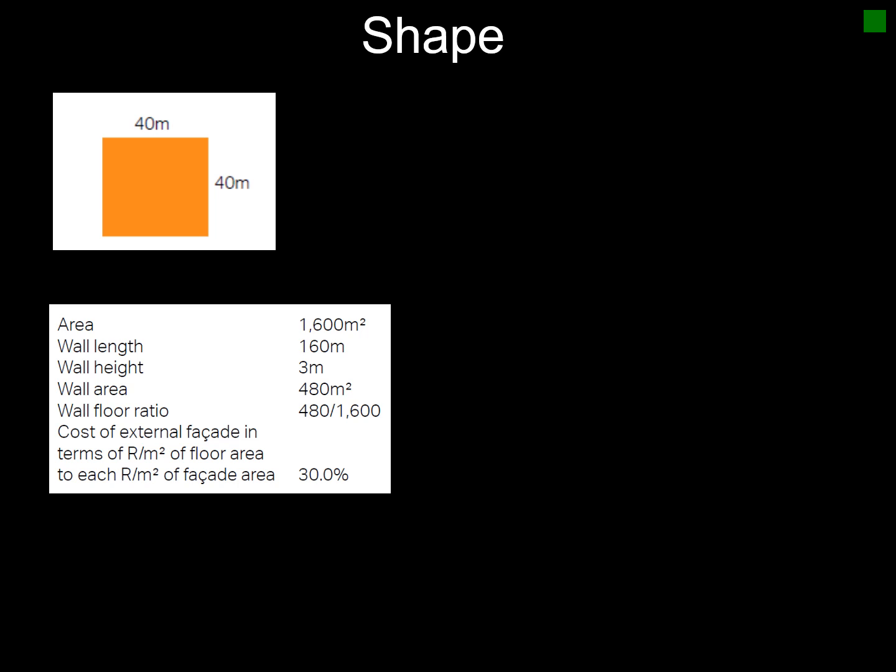The wall length is 160 meters, the wall height is 3 meters, and the wall area is thus 480 square meters. The floor ratio is 480 over 1,600 square meters. You can calculate the cost of the external facade in rand per square meter of floor area — it works out at roughly 30% of your cost.